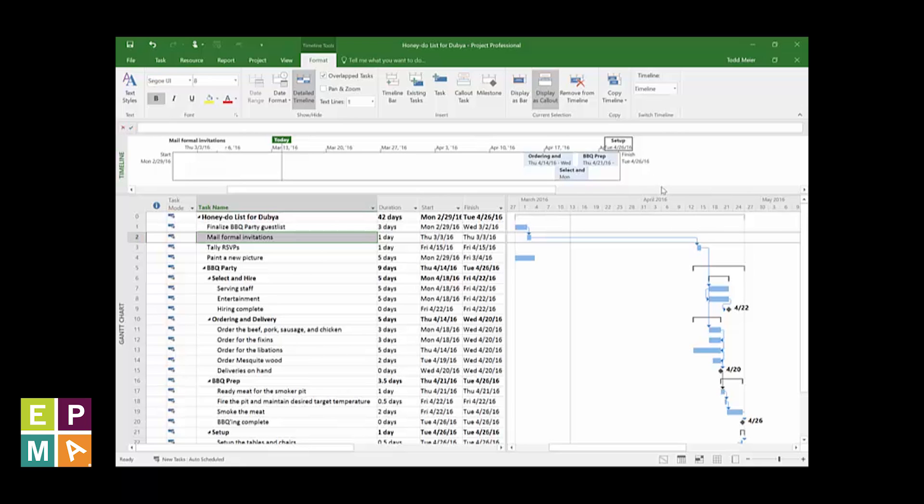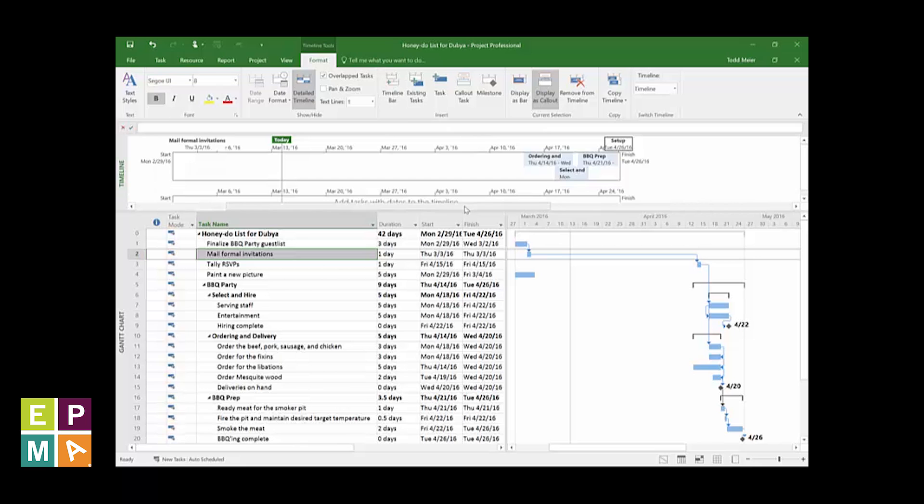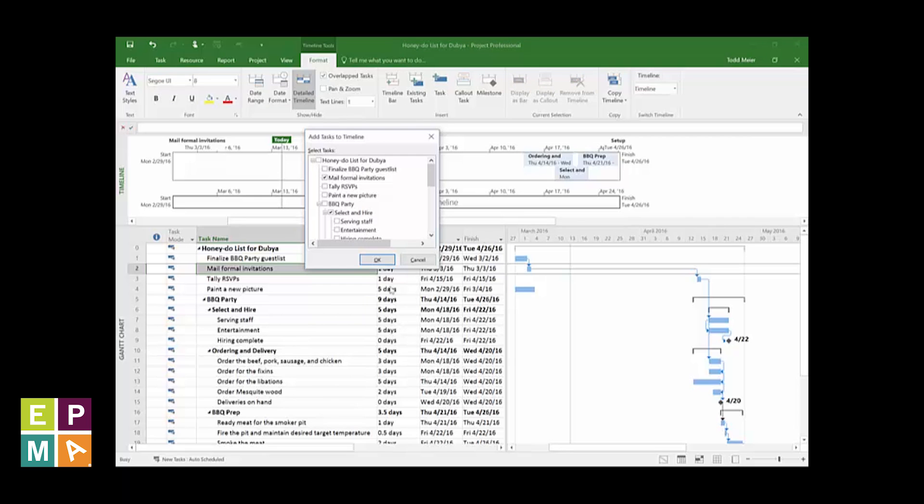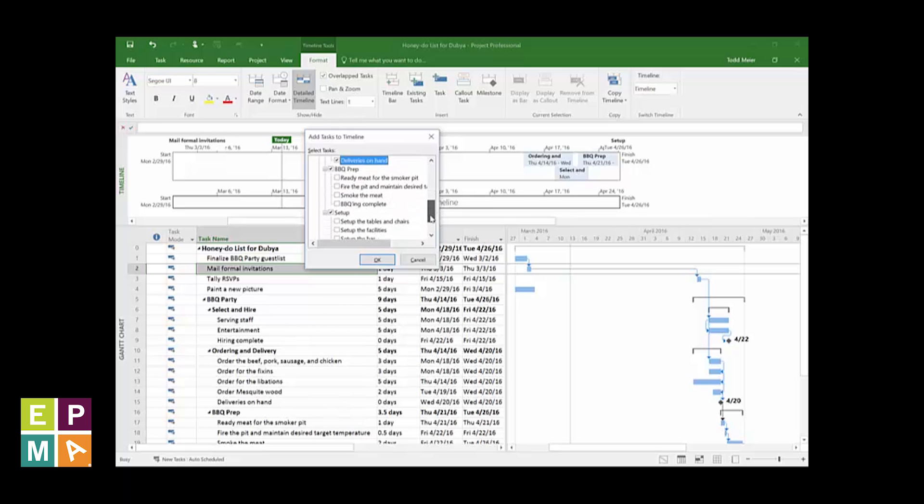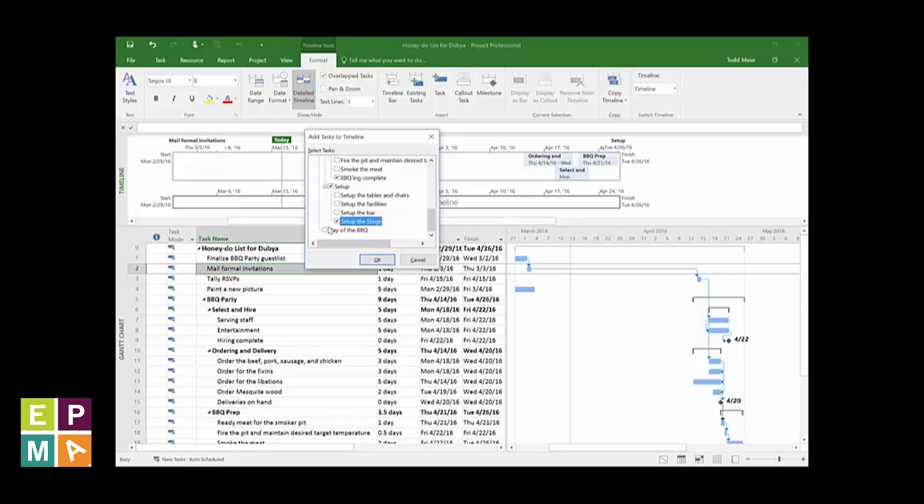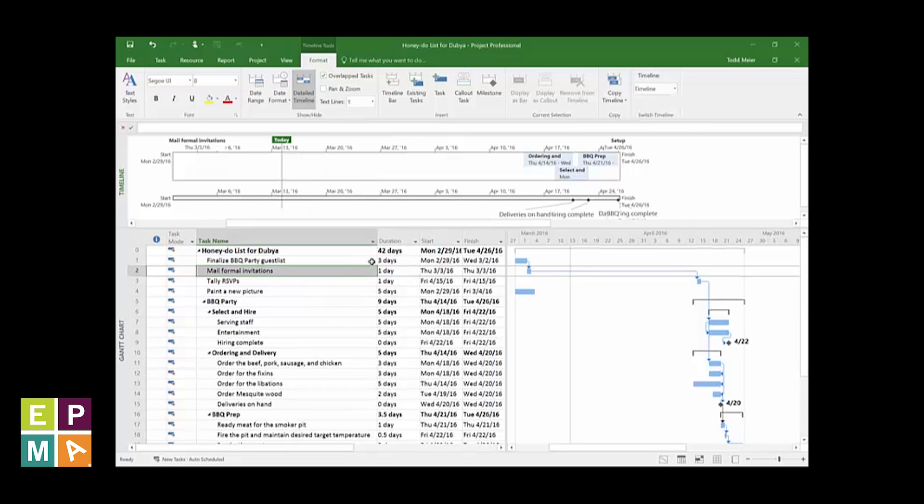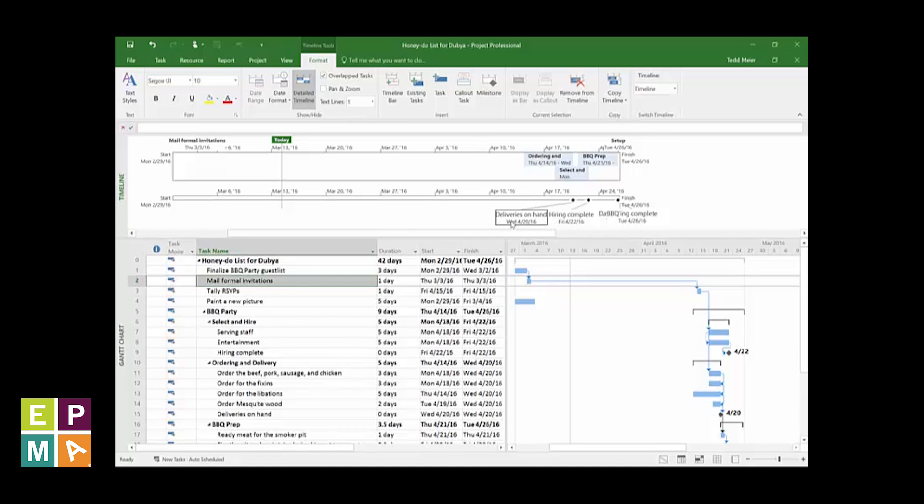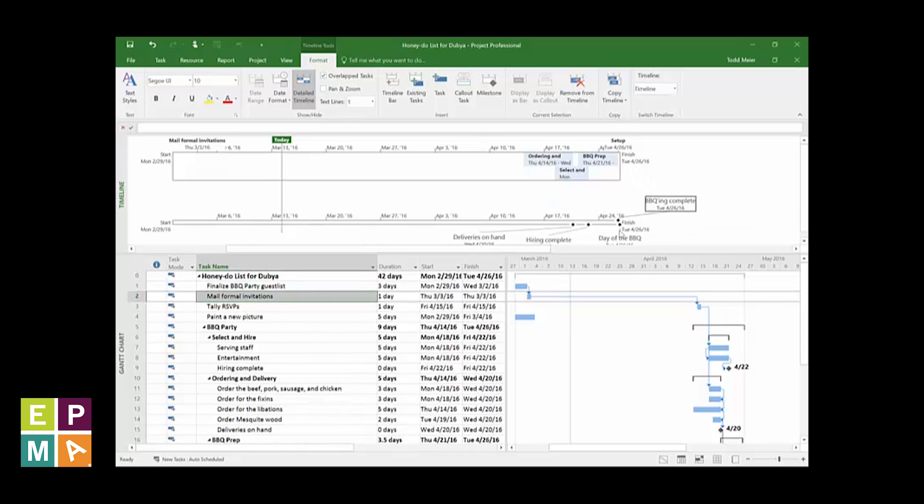Here's another little trick I like to teach you, Brownie. I'm going to add another timeline to my schedule display here and fill it with my milestones. In the Insert section of the ribbon, click on the Timeline bar. Next, I'll click on the new timeline that was just inserted. Then, click on the Existing Tasks button again, and in the pop-up box, I'll select my Milestones. I can see that they're hard to read on account of them being on top of one another. But I think you've misunderstood my abilities with this tool. Look at this. I'm the decider on how these should look. You can grab the Milestones on the timeline and move them where you want to make a more visual impact.